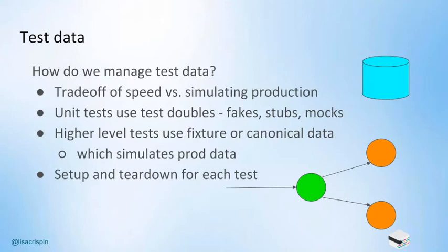I remember one time when we were having a problem that took so long to refresh test data, and it was really slowing us down. And somebody had the idea to put up an impediment board. We never had one before. So we put that up on the impediment list, and our database expert saw it, and he's like, oh, well, I didn't know you were having that problem. And he got together with the system administrator and fixed it. He just wasn't aware we had the problem. So sometimes it's just a question of making problems visible.